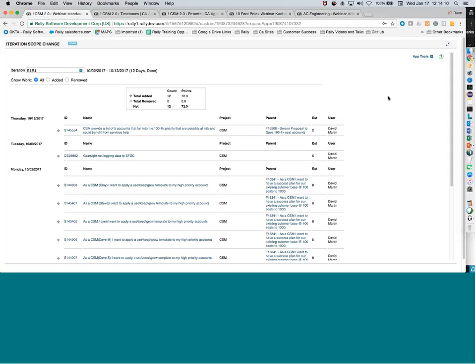The kind of things that you want to look out for are lines that are trending up. That's an indication that it's taking longer for items to flow through your process. And again, looking at a single chart at a single point in time is not the only way to understand what's going on. Taking things together in context of other events is important, right? We may be at the end of the year, holiday time, so we don't have as many folks, so sure, work takes a little longer to get through the process.